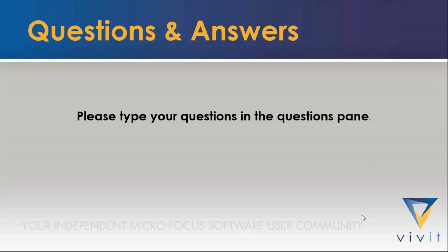Other than that, we tried to limit customization, and hence the implementation focused on a like-for-like approach. We tried to limit customization into SMAX as a first phase implementation. And I think if you take that approach, you won't run into challenges when you're trying to implement SMAX.